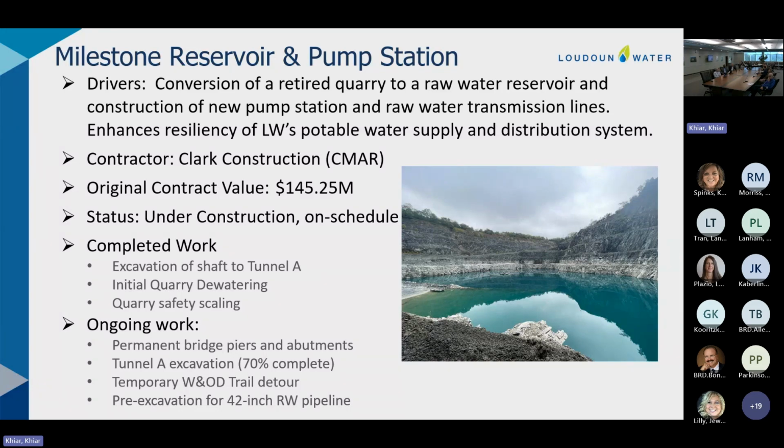Is that a paved detour or gravel? It is a paved detour roughly along the abutment to the pump station site. And then it meets the trail at a reinforced concrete pad that we are currently using in case of any crossings along the trail. We want to mitigate the impact to the existing trail and the detour so that we're not leaving ruts with heavy equipment that could then cause issues for bikers or trail users, things like that.